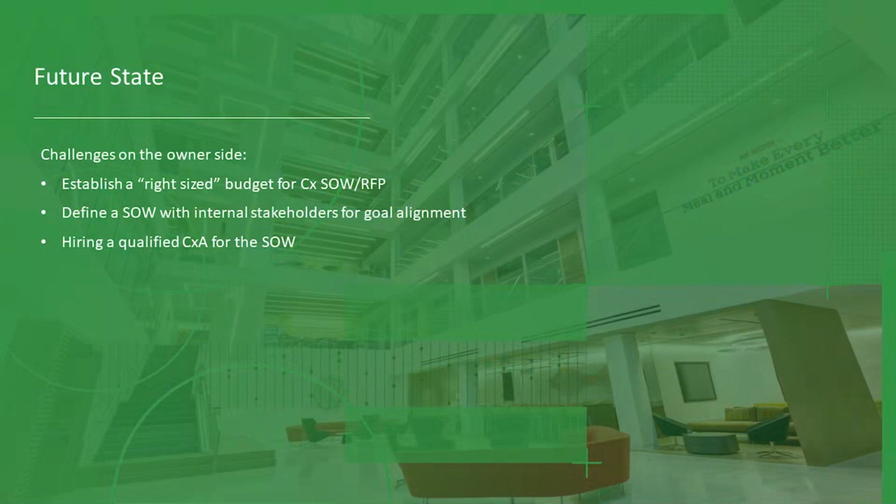And a good example is this facility that we're at right now in Illinois. It's about 3.5 million square feet. And we have 58 rooftop units that are in various states of operation. Some have been commissioned, some of them have never been turned on. None of them have BAS interface, no networking. We don't even know how they're operating. So we have to go back and retro-commission or recommission equipment that we paid contractors to install, a vendor to do startup on, and a commissioning agent to commission, right? So I have a hard time trusting a lot of the data until we actually physically go out and verify it ourselves.